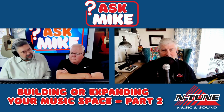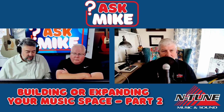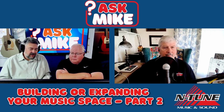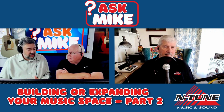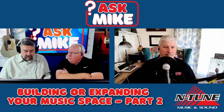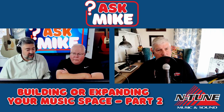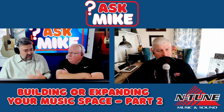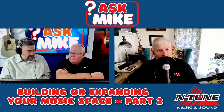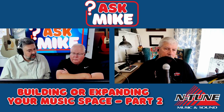I guess that depends on the person and their level of interest. Quite frankly, we have construction meetings on site. If this project is happening at Abilene High, we'll meet in a room that's finished, and then we walk the project every week and get an update. You get plans, timelines, and progress, and you go see what's done. That allows me, another set of eyes, to say, hey, that's not right, what's going on here? At times we found mistakes along the way, and that gives them a chance to fix what's not going right.